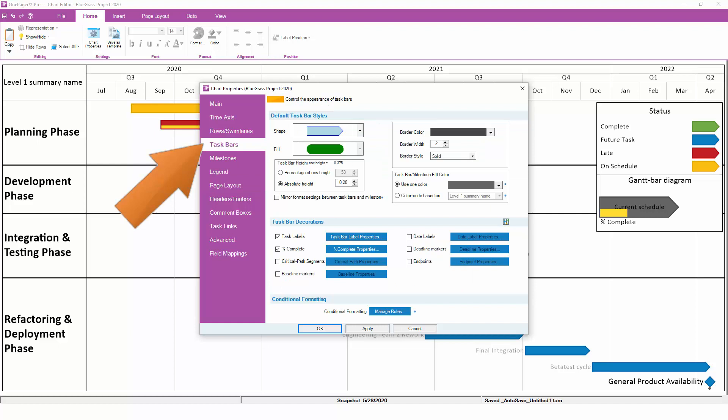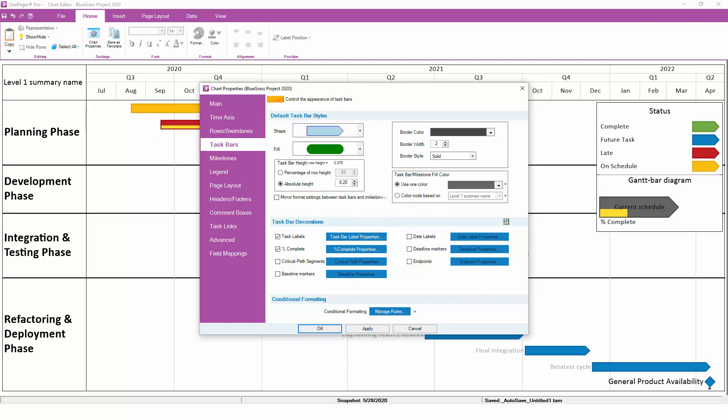By the way, remember that you can also adjust your Shape Height on the Task Bars and Milestones tabs. The Shape Height and the Row Height are closely related. If you want to increase or decrease the amount of white space between each task or milestone, it's usually a question of looking at the Shape Height and comparing it to the Row Height. The bigger the Row Height is compared to the Shape Height, the more white space you'll have.